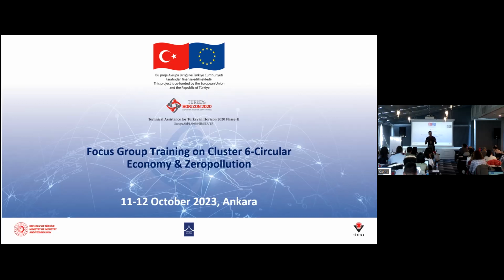Why 5 years? Because 5 years is a nice strategy, first of all. It's good to have not 10, not 3, 5 is something that is more possible. And secondly, all the project results, I don't know whether you know that, in Horizon Europe, according to Article 27 or Article 29 from the grant agreement, Flavia yesterday showed also the grant agreement a little bit, the mandate. All the projects that are funded from Horizon Europe are subject to an impact audit up to 5 years after their end. So whenever you finish your project, that doesn't mean that you're okay. You might be audited, not from the financial point of view, but from the impact point of view, up to 5 years after its end.